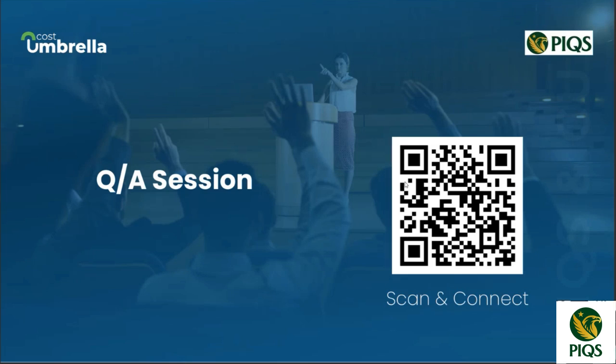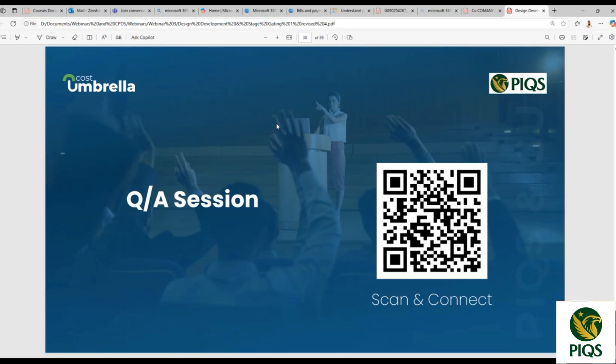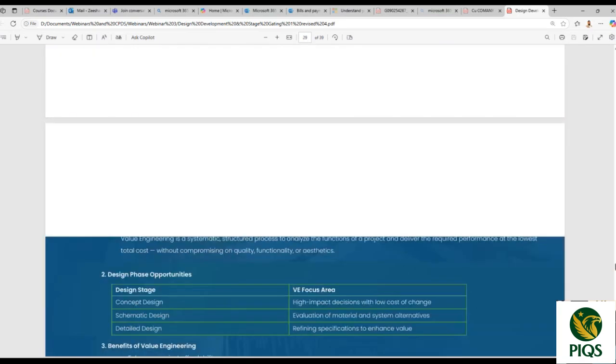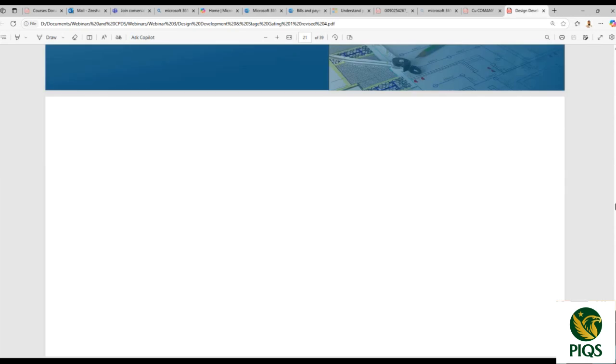Basically, in the IFC stage, it will lead to a variation order, but in IFT, it will not. If you see the slide I have shown, 4.1 and 4.2, we have shown the difference. So you will face a variation order once there is a change in the IFC drawing, but in IFT, no. Thank you. I would also like to add something to it.